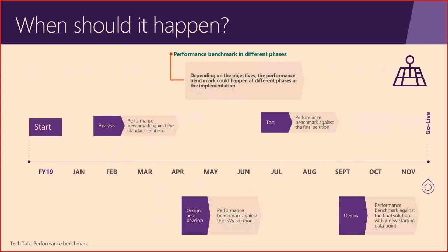Depending on your need, you may do the performance benchmark quite early in the project, during the project, or even after go live. For example, if you want to really validate the standard solution and its capabilities, you could do it during the analysis phase. If you want to actually test the ISV solution, you could do it during the design and development phase because you already have the solution from the ISV.